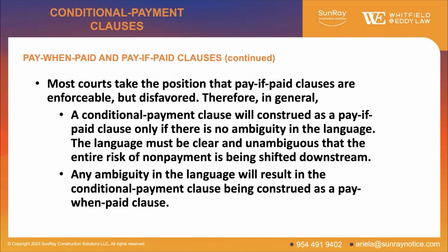Well, if you have a dispute over this in court on whether a provision is a pay if paid or pay when paid, courts will construe it as a pay if paid clause only if there's no ambiguity. So what that means is the language has to be clear that the entire risk of non-payment is being shifted to the sub. Any ambiguity on that, the courts generally will construe it as a pay when paid clause. So if we go to the next slide.